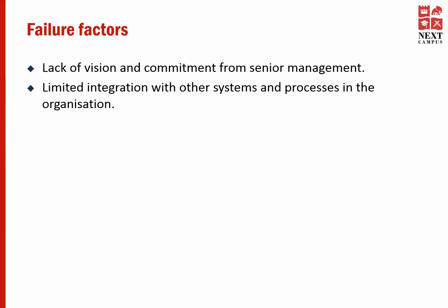Second, limited integration with other systems and processes in the organization. While you are trying to implement a change within your project context, it's important to understand the relationships between your change and the other systems. If there are direct links, if there are dependencies, you need to manage these dependencies and integrate those into your changes.